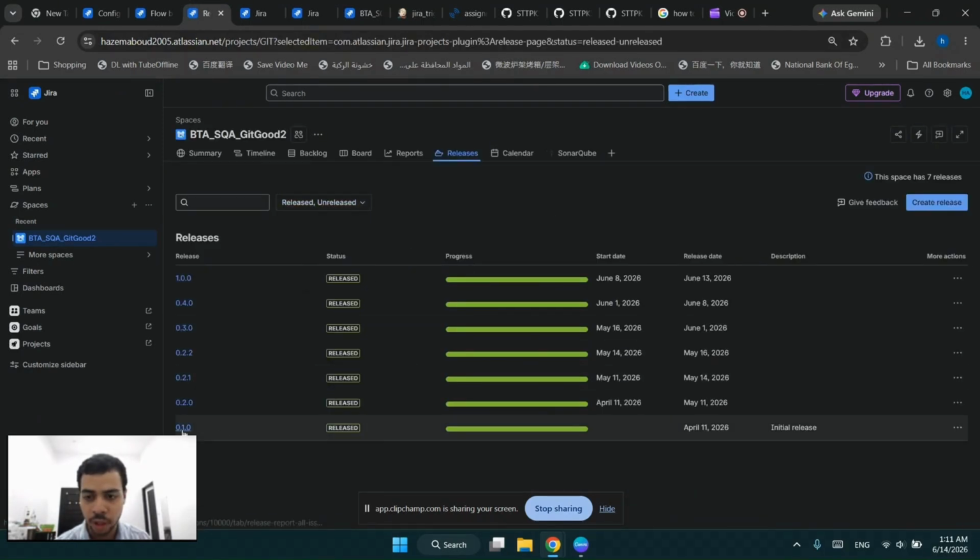So we track app versions, like 0.0. The first number is major release. The second number is minor release, which typically includes one or more features from the functional requirements. And the final number is just bug fixes. So as you can see, we have completed all the related tasks for each version. All of them are released on GitHub, and also the final versions are web hosted.